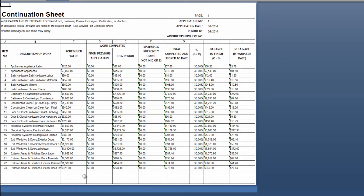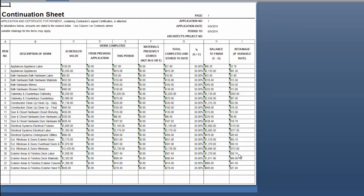On this G703 form you will see the description of the work broken down by category and subcategory. You'll see the scheduled value pulled from the QuickBooks estimate. Any previous applied payments will be shown here, but since this is our first application we have none. You will then see the amount applied for this period — the total of all invoiced amounts included on this application for each one of these items — as well as materials presently stored if you chose to put any values in that option in the wizard. The total completed and stored to date will combine the previous applications and this period, and it will give you the percentage complete, the balance to finish, and the retainage withheld if you have applied that.